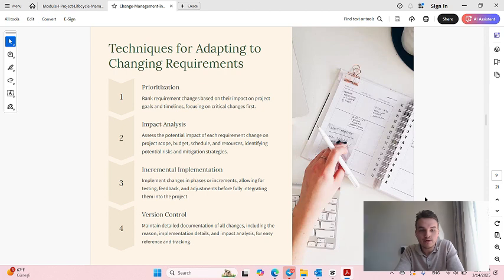Firstly, you will need to do prioritization, right? This is on the assess phase. You need to make sure that after you recognized all the changes that you are potentially going to face, you decide which ones are more important, which ones are going to be addressed first. And this is similar to risk management, where you assign priority. You also need to assign priority to changes.